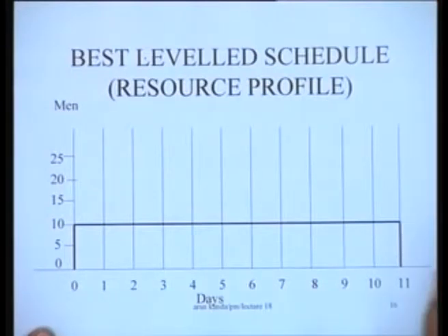But if you follow the other case, you would have lots of costs of hiring and firing people, and you might even have difficulties in trying to recruit manpower for doing that kind of job, especially if the resources that you are talking about are skilled resources, like skilled engineering manpower or skilled managerial manpower. Then their availability is typically limited and it becomes very difficult to find or implement a schedule which has a lot of fluctuation in the resource profile.